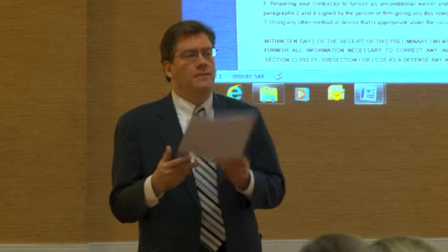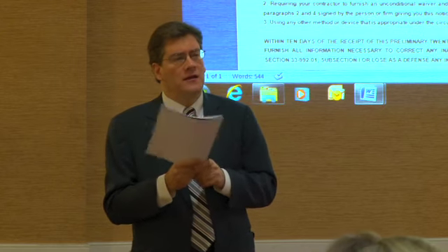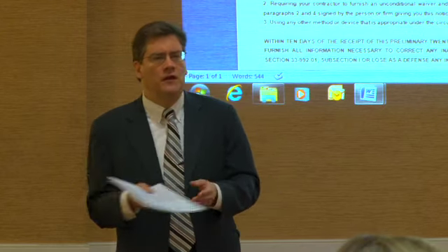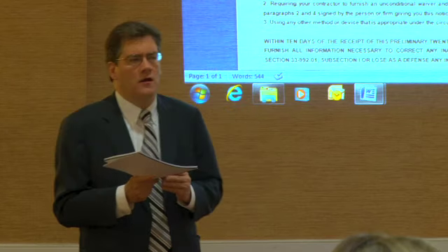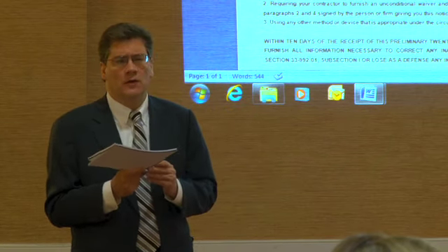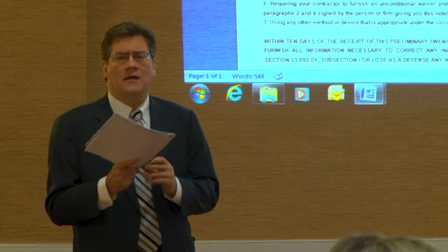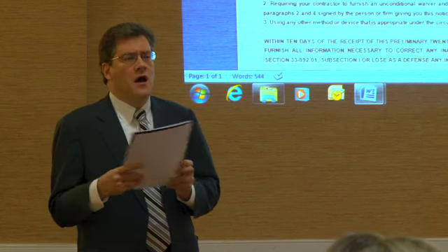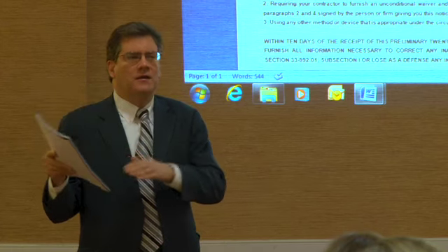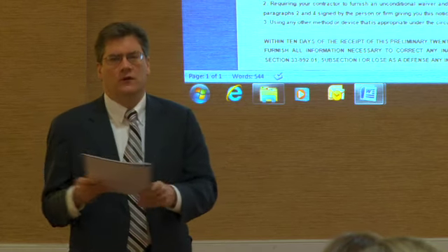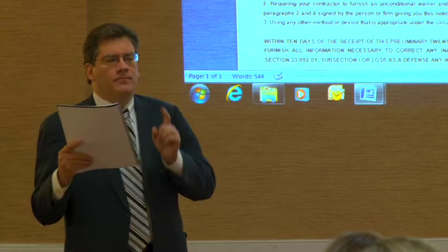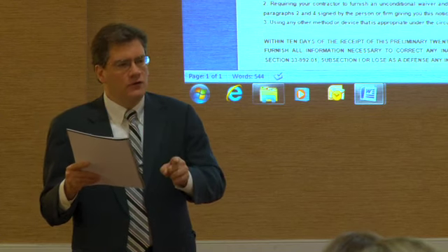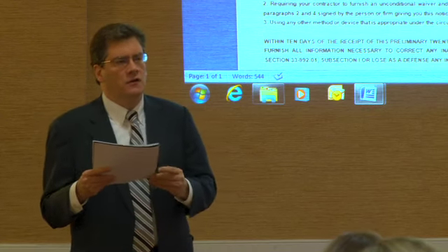Now, even on the 90-day letter, and this is really for the second session, but you're required on what's called a Little Miller Act in Arizona to send a 90-day letter out to the general contractor, and they have to receive it within 90 days of your last supply of labor or materials. That does not have to go to the surety. That only has to go to the general contractor.